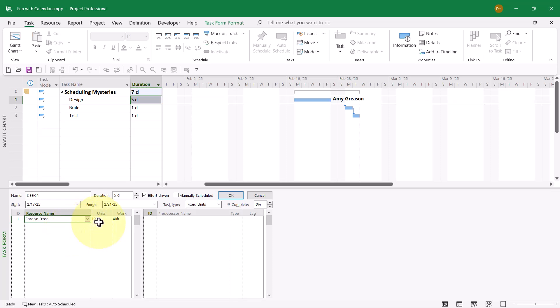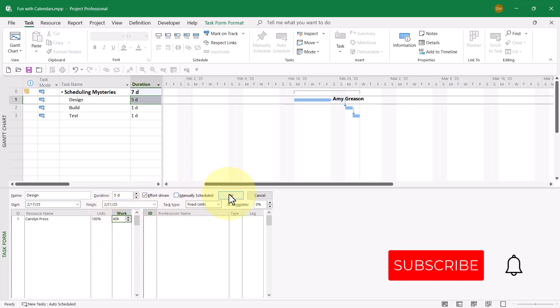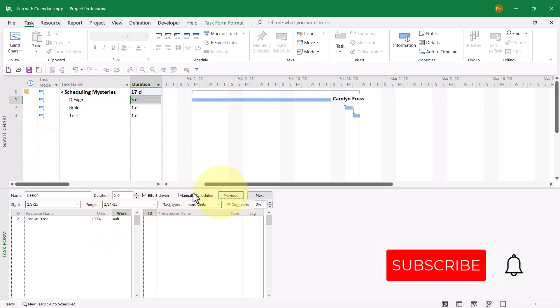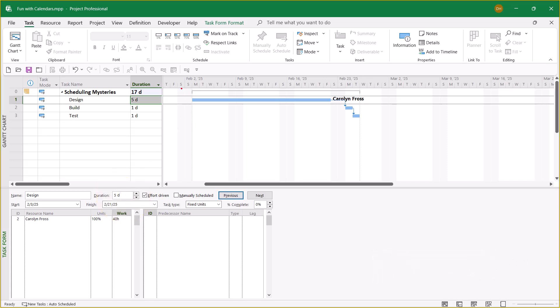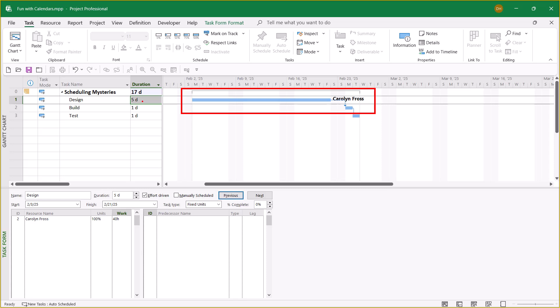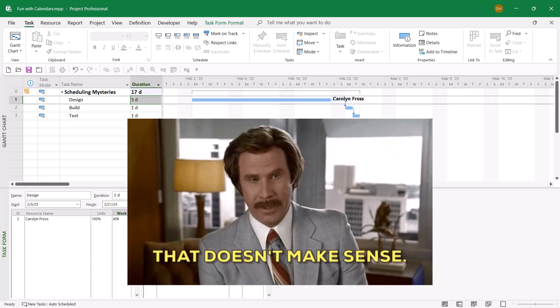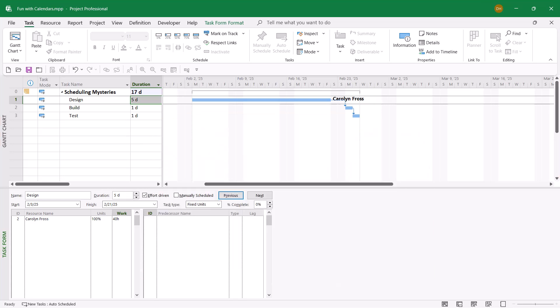We'll leave Carolyn to work full-time for 40 hours. I click OK. The duration remains at five days. However, we have an even weirder scheduling issue. Now the task spans over three working weeks, except the duration still remains at five days. What in the world is going on here?